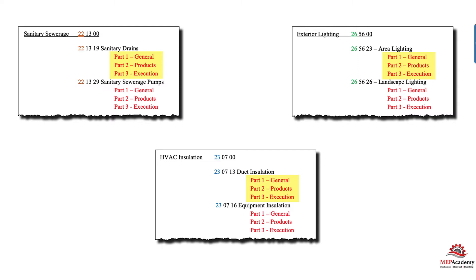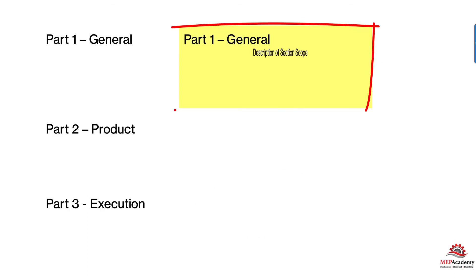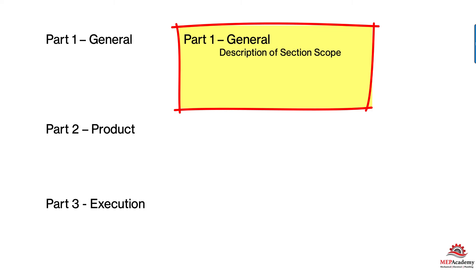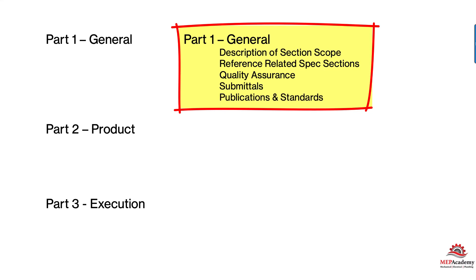After you have those categories, within each category you'll have three parts — Part 1, Part 2, and Part 3. These three parts are the same in every division and every category. Part 1 is General, and it gives a description of that section of the scope. It references any related spec sections — within your division or outside of it — as well as Quality Assurance, Submittal Requirements, and Publications and Standards. This gets repeated in each division category.